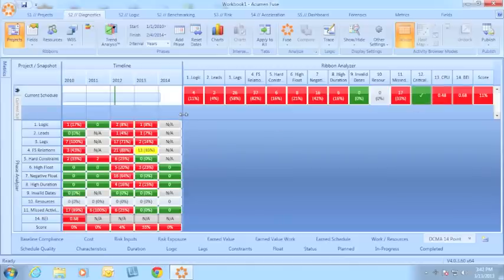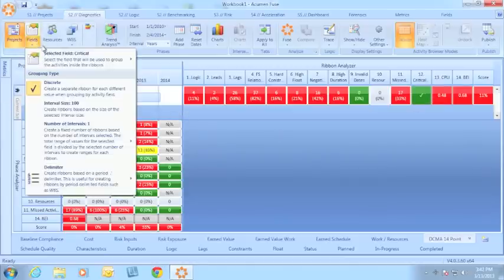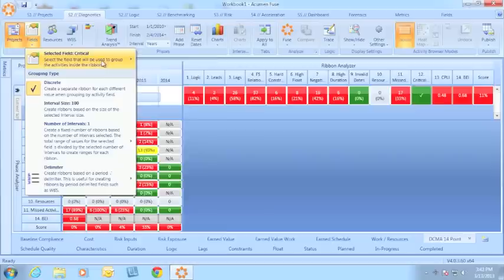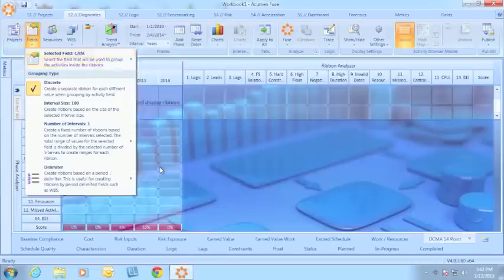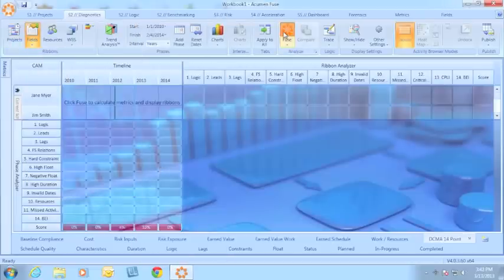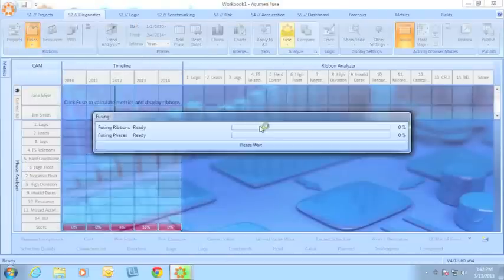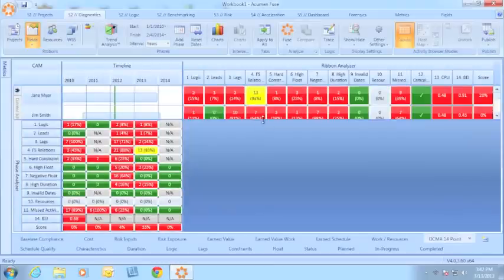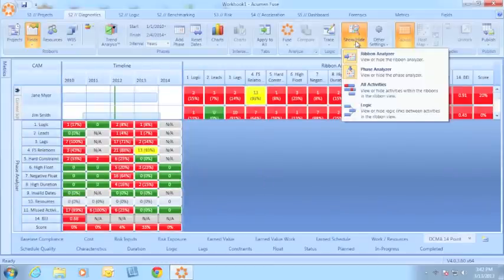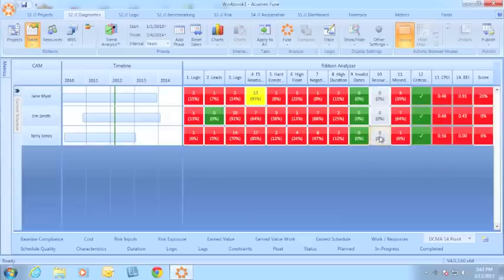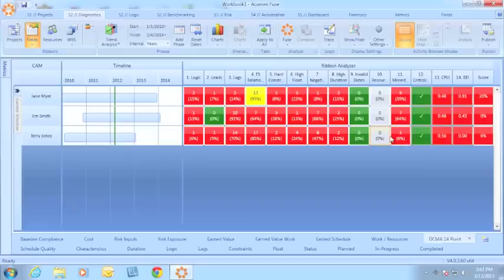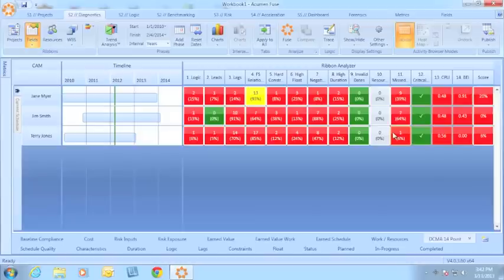We can do this by any group. If I wanted to look at my control account manager, I can see how each control account manager is performing against the DCMA's checks. This helps me be sure that my schedule is ready to go through a DCMA audit or helps me pre-assess my schedule before submitting it to that audit.